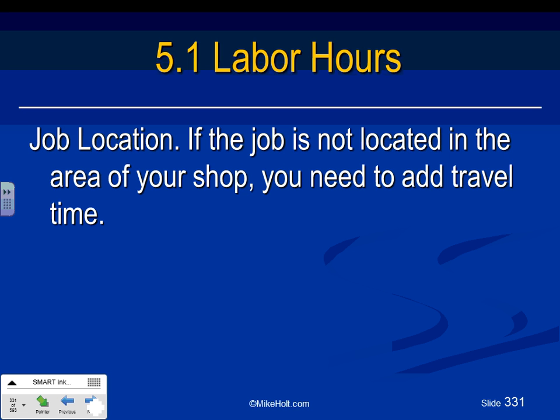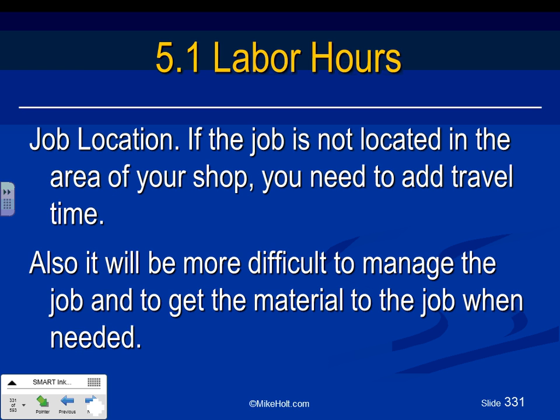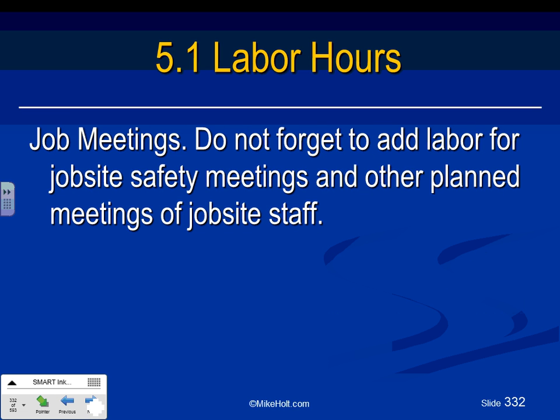Job location, area of the shop, you need to add travel time. If your job location is far away from where most of your labor works, guys, you need to accommodate for the time to travel there. It's more difficult to manage the job if it's further away and bring the material, so that has to add to your labor.